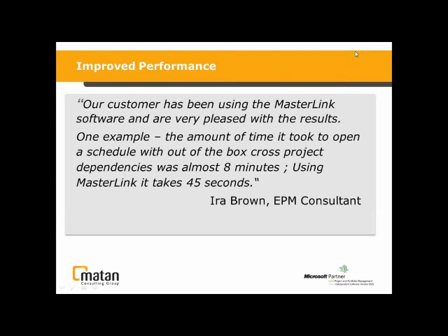And then we can go and look, maybe that project manager needs to assign some of the work packages to other people to have them responsible for a certain number of lines there, and then he can manage them using Masterlink in the different project files. So I don't have a magic number that tells you exactly, if I get to 1,000 lines, I want to break it out into 2 project files. I don't have that. But it really depends on who's managing the project file and the work packages, and can he actually manage so many? Okay, so those are the questions that would lead you to a good practice in that department.